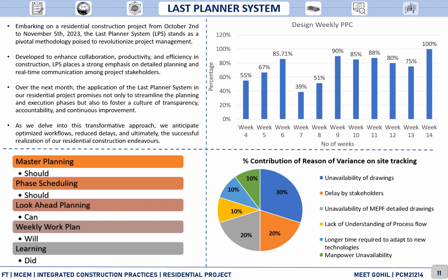The major percentage contribution of reasons of variance on-site tracking was also observed, such as unavailability of drawings on site, delays by the stakeholders, unavailability of MEPF detailed drawings on site, lack of understanding of the process flows, longer time required to adapt new technologies, and manpower unavailability.